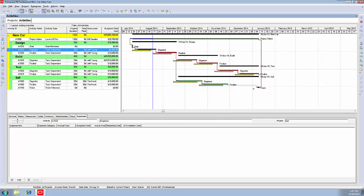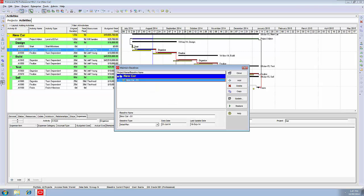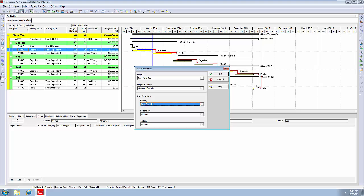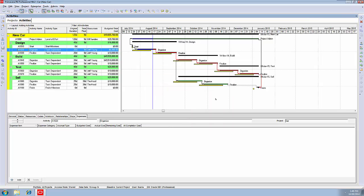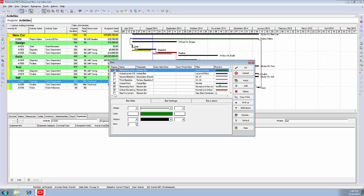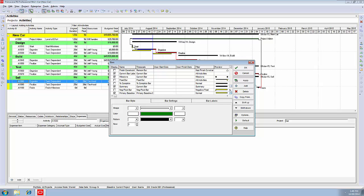One other thing to talk about at this point in time is the baselines. Remember, when we created the baseline, we said it was a three-stage affair. First, we went to maintain baselines and added a new baseline, B1. Then, we went to the assign baselines dialog box and put in B1 as a primary user baseline. We've assigned the baseline. And then, we went into the bars dialog, the third stage, and ticked on the primary baseline and its milestone in order to see them in the Gantt chart. It's a three-stage thing.